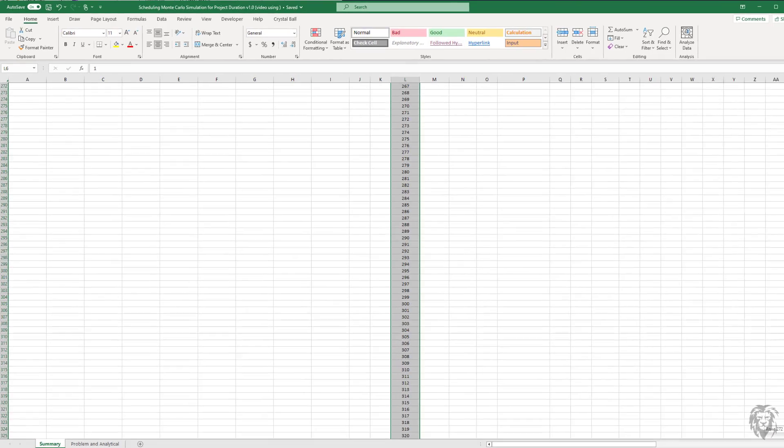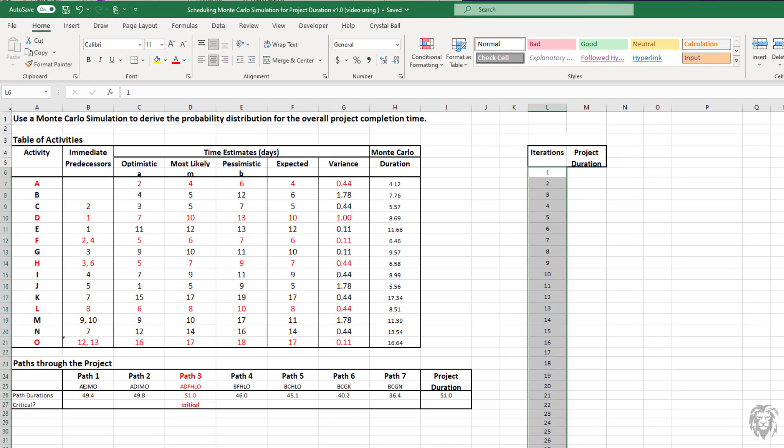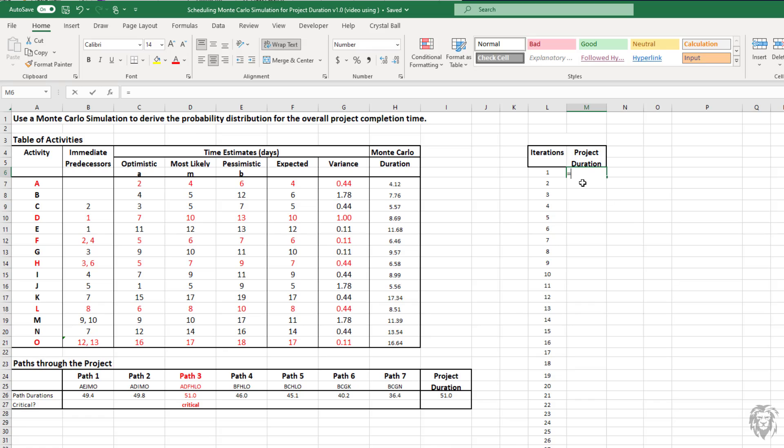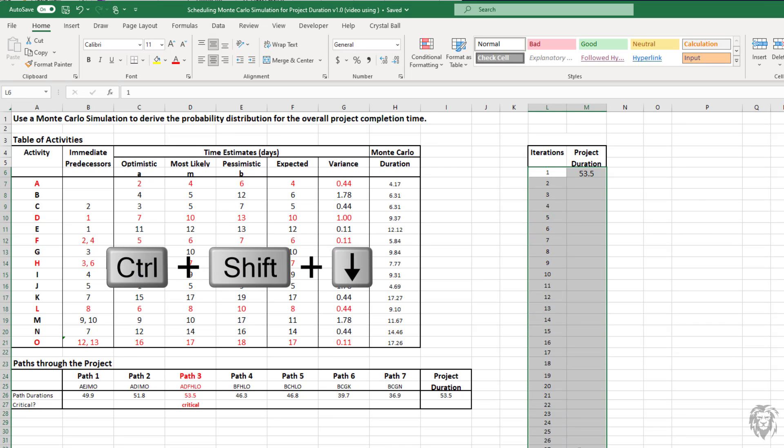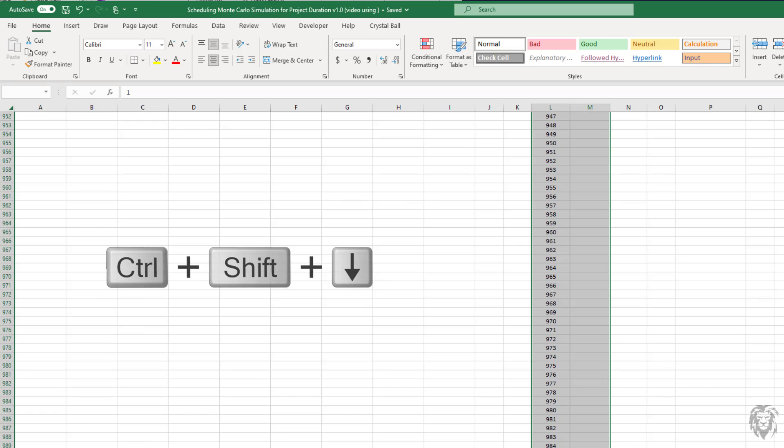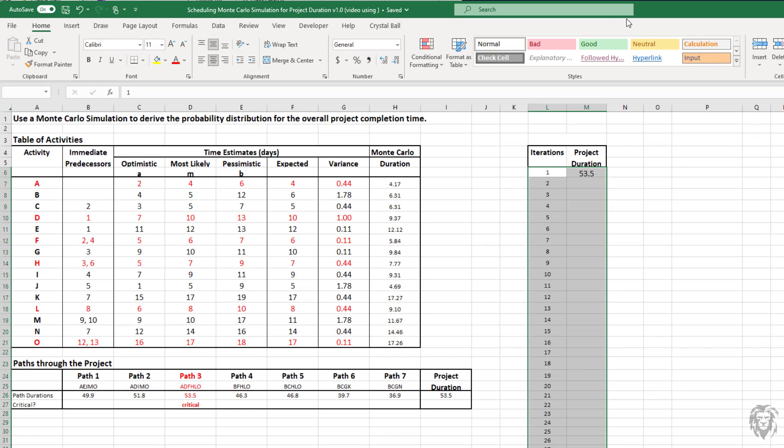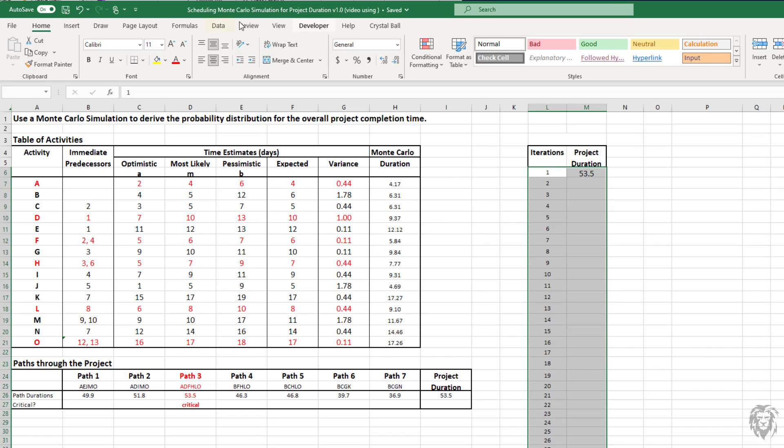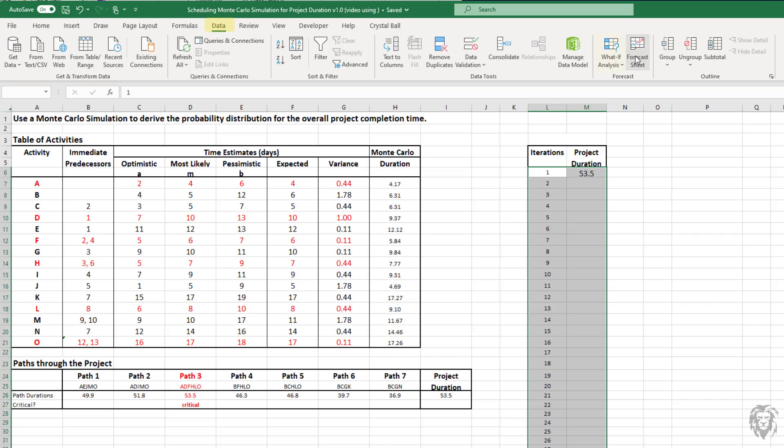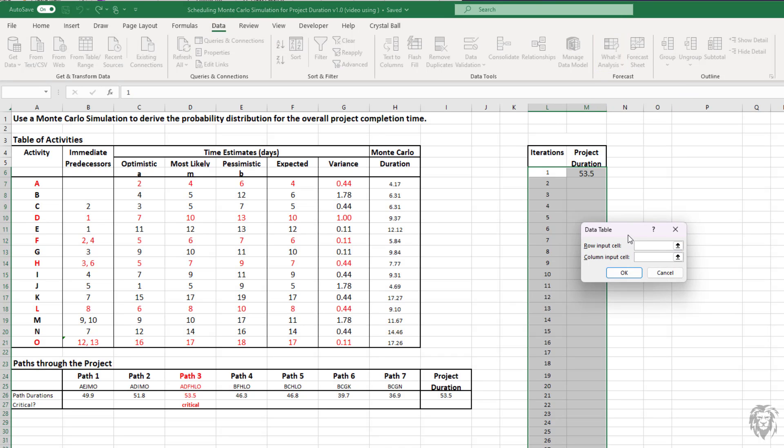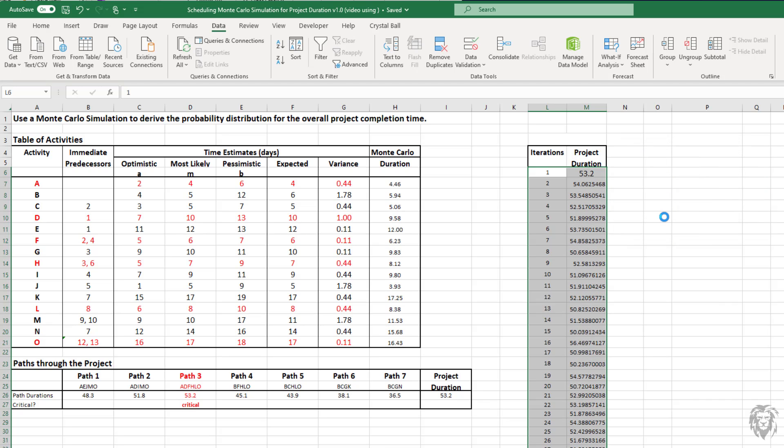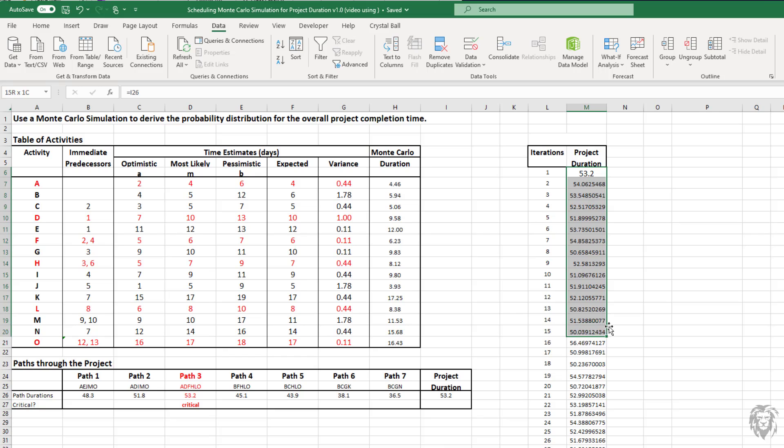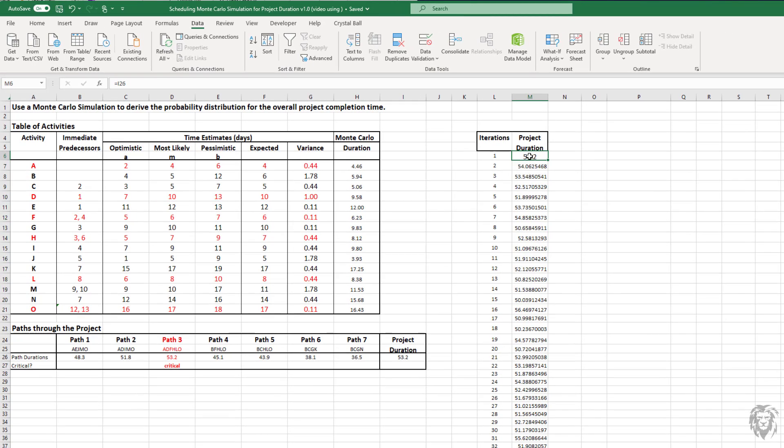Go back to the top. We're going to make this equal to our project duration. Now when we look at our data tables, Control-Shift down, go back up to the top, go to the data tab, and use what-if analysis. We're going to choose our data table. Don't need anything for the row input cell and the column input cell, any empty cell that's not in our data table. If we choose OK, we will see Excel generates a whole bunch of different iterations of our data. Now we can use all of these durations as a set to analyze the uncertainties around it.